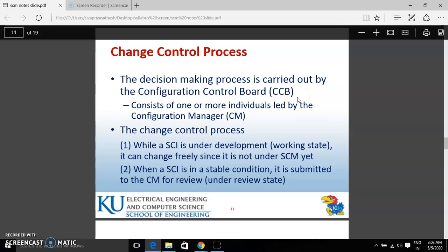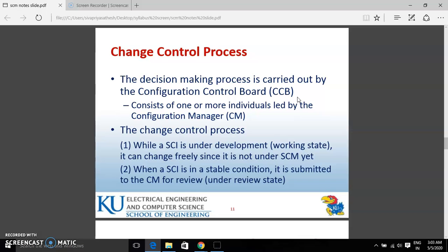So what are the main factors and the key processes of software configuration? The configuration control board consists of a group of people. For example, in a very large project, the functions of the change control board are normally discharged by the project manager or some senior member of the development team. Once the CCB reviews the changes to the model, the project manager updates the old configuration item. A configuration control tool does not allow a developer to replace a work product. He must get an authorization from the change control board. Then only can you successfully produce your project. An incomplete or improperly modified work product cannot be updated in the configuration.